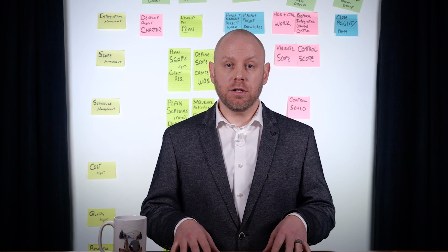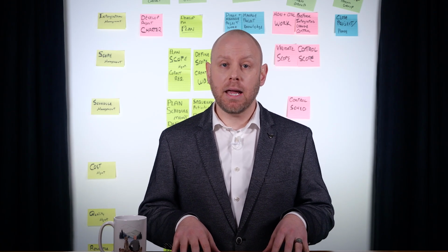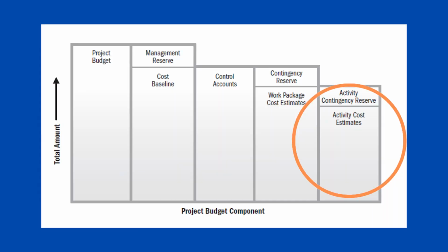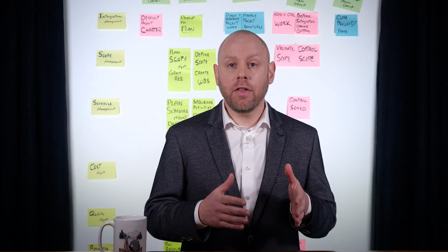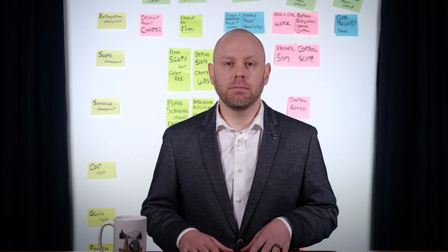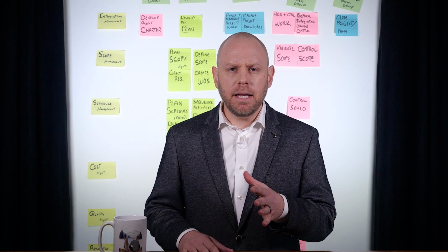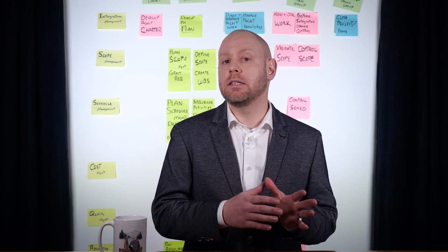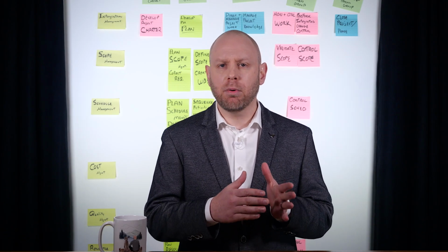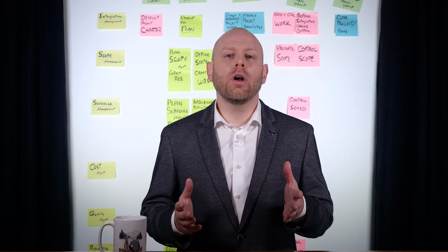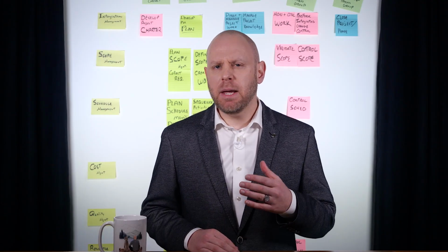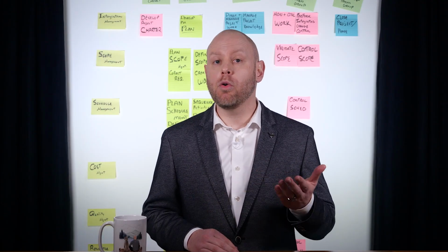When calculating your budget, there are several components that make up the project budget. The first is estimated activity cost, or the total cost of our activities on the activity list from last episode. Add onto this a contingency amount. This can be estimated using the worst case scenario from the 3-point estimating process, PERT, or a historical amount based on the impacts of labor, resources, or the environment.